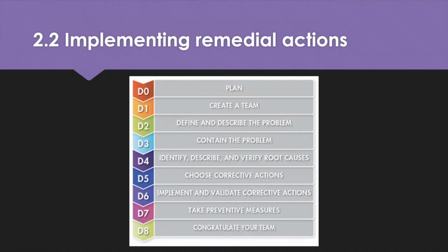Now, remedial action is the name commonly given to the corrective work that is carried out within the project. It's a form of corrective action, but it's distinguished from those equally important tasks which prevent the problem from reoccurring. But remedial and preventative actions will often be implemented together. So corrective action generally refers to a process in which problems are initially identified, the causes are analysed, solutions are applied, and processes are changed to prevent it from reoccurring.